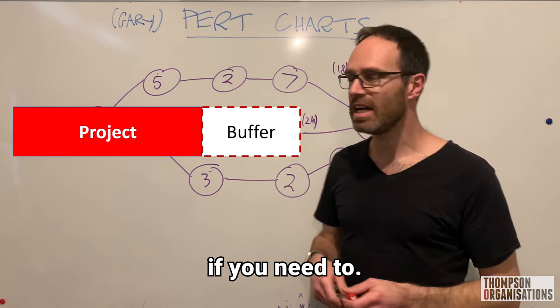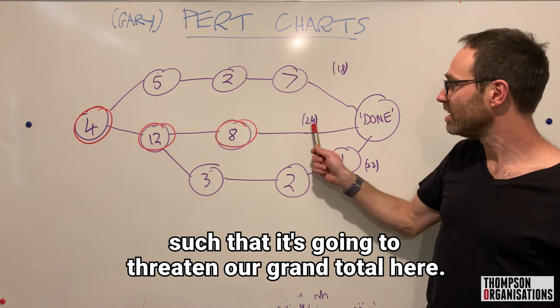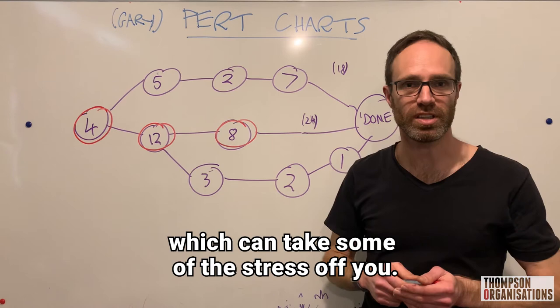We only need to worry about these ones if they're taking a bit of extra time, such that it's going to threaten our grand total here. So you don't need to manage that line and that line as closely, which can take some of the stress off you. But for these people, ask them at the end of every day, how much longer it's taking. And this is the power of the PERT chart.